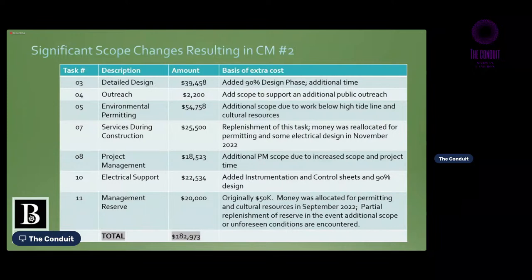There were subsequent meetings, and a work plan was developed specifically as a phased work plan. Any work that occurred within the Manette site had to be done with archaeologists monitoring the work. It's going to continue to be that way. When we go into phase three of the work for the construction, we'll have archaeologists out there during the work. None of us have had this level of archaeological scrutiny on a project before, so we appreciate the support.